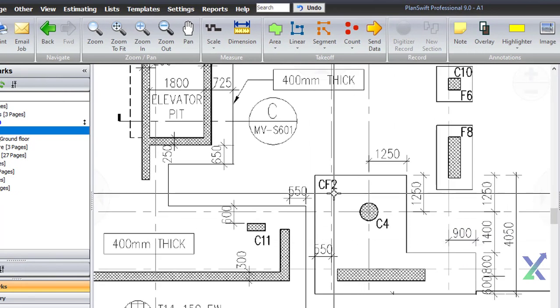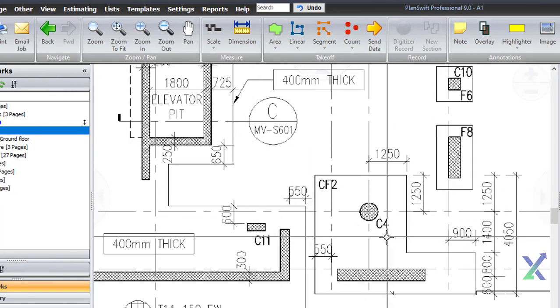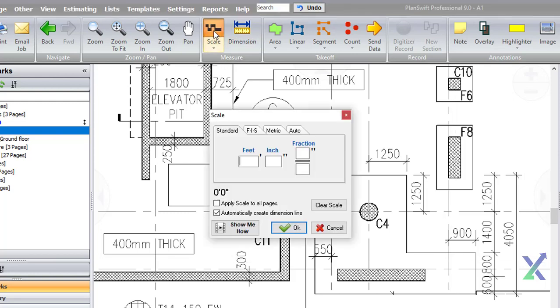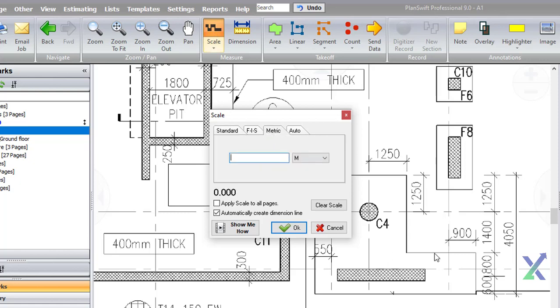The first step is to scale our drawings, especially when using area or linear measurements. To do this, click on the Scale button and choose the metric system with meters as the unit of measure.